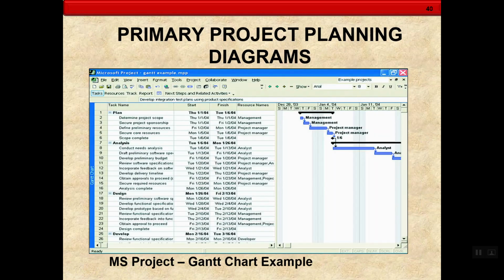So this is just an example of what a project plan looks like, an organization of the steps, with different tasks, the definition of start and stop, and the resources that are required. Microsoft Project becomes the primary tool a lot of organizations use to manage their projects, to detail and document everything. Having been involved with a lot of projects, these can be a couple thousand steps, spanning longer periods of time with different resources and different work streams.